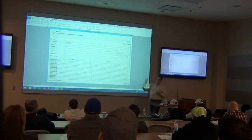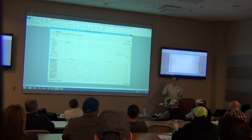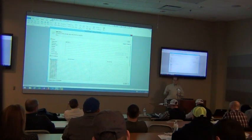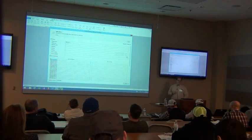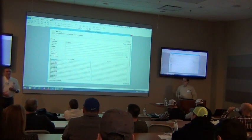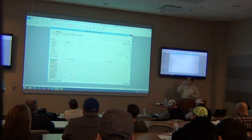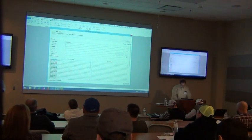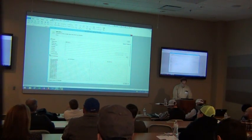Some clients actually print proposals out of the system where the proposal says 'this estimate was based on plans dated as of whatever.' That piece of paper has some sort of tie back to that particular version of the estimate. Keeping track of what documents you used to compile this estimate is an important factor for other people on the team later on — if there's a claim or challenge on the job, that's an important piece of information.